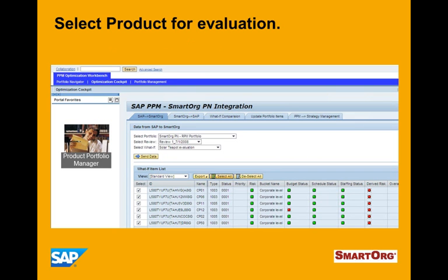So first of all, in the PPM system, we're going to say, let's look at the projects that have been proposed, particularly the ideation. And here you have used the traditional approach to selecting projects, like scorecards and various kinds of questionnaires and numeric systems that say, look, let's do a quick cut on this, a coarse evaluation, and whittle these things down to something that makes sense. Such things as, what's the strategic fit here? Does this thing really build on the markets that we already know, or does it not? Do we have the technology to do this and such?